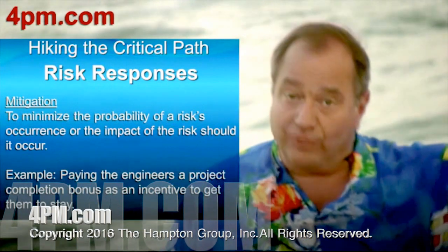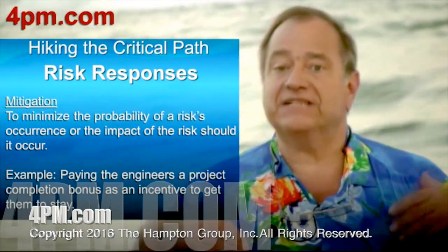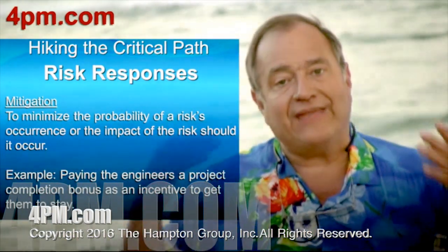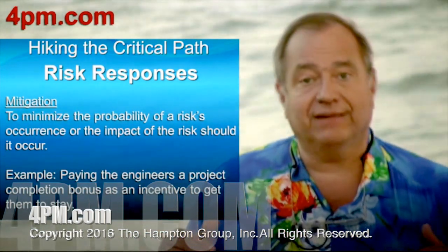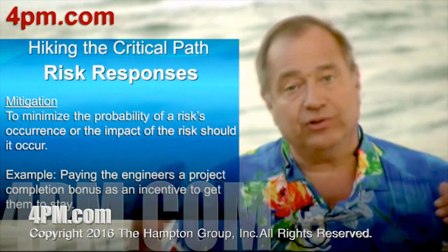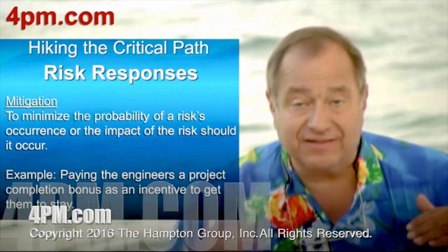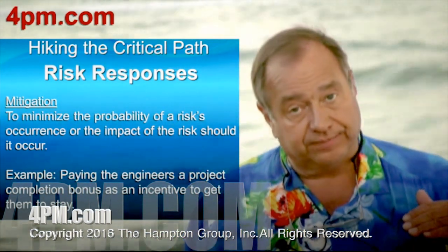Okay, the first risk response strategy was avoidance, and the second one is mitigation. And that's where we take actions that reduce the probability of the risk and/or reduce the size of the impact if it does occur.